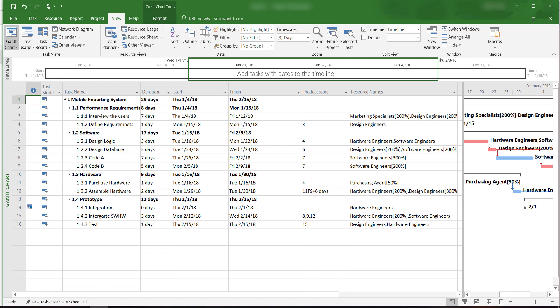At this point, we have already identified all tasks, entered estimated task durations, assigned resources, and resolved the overall allocation issues. We are now ready to save this plan as a baseline plan.